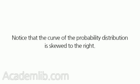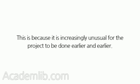Notice that the curve of the probability distribution is skewed to the right. This is because it is increasingly unusual for the project to be done earlier and earlier.